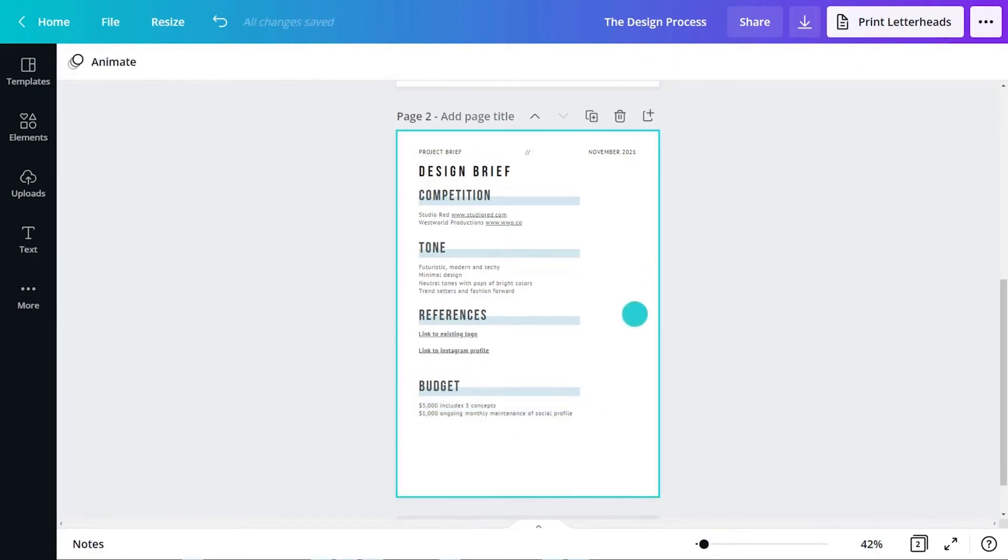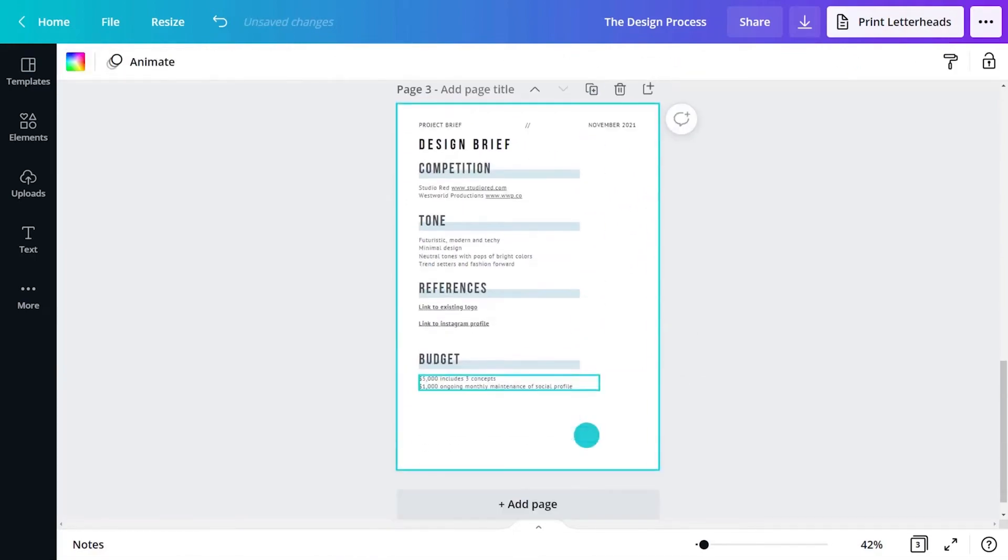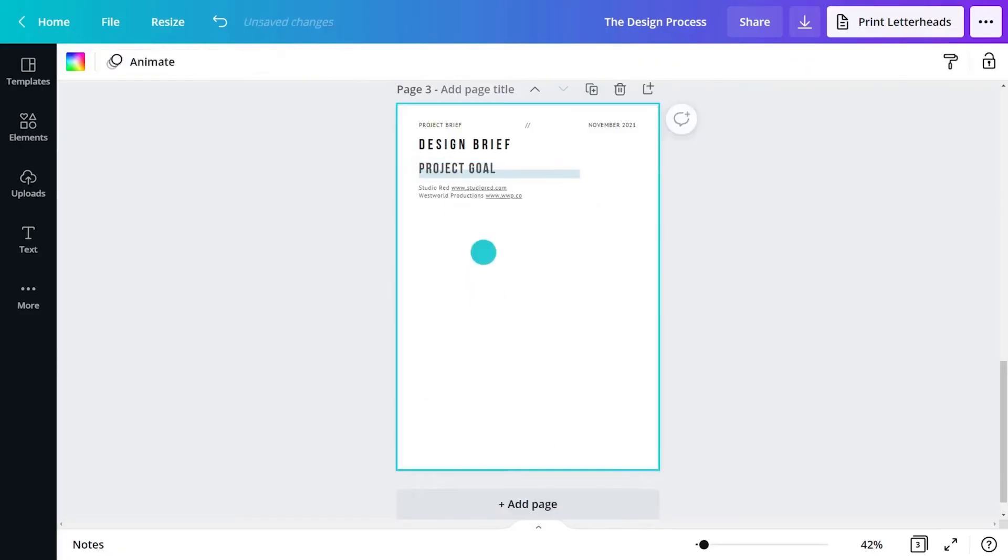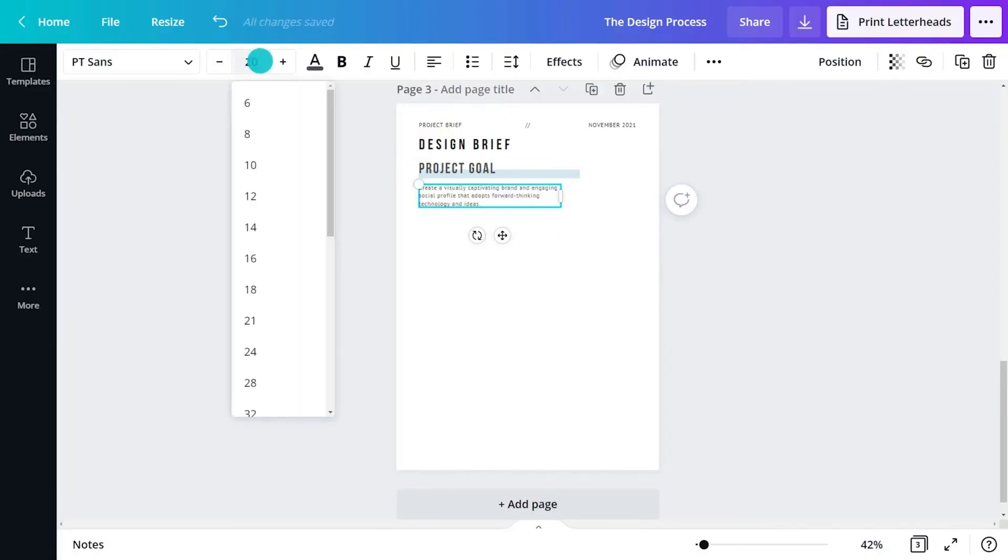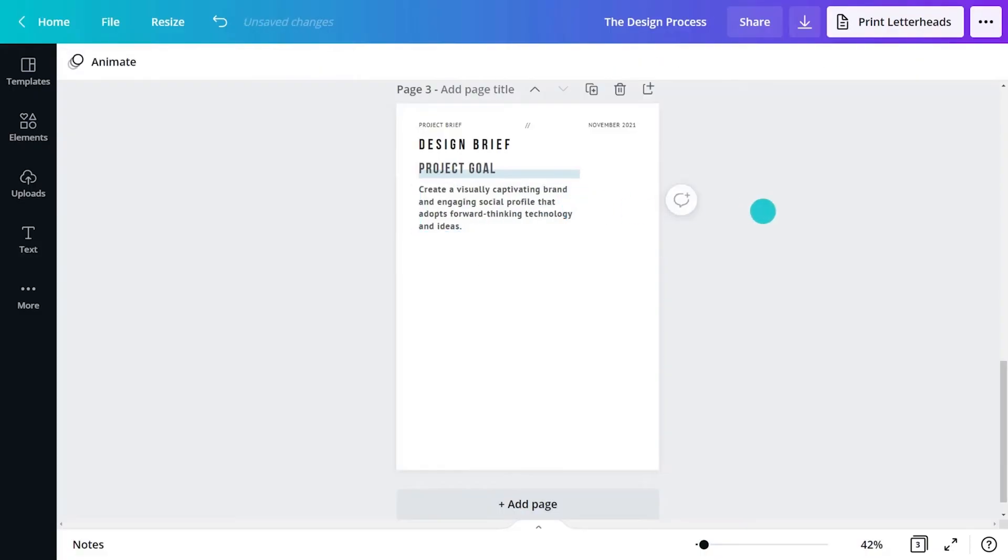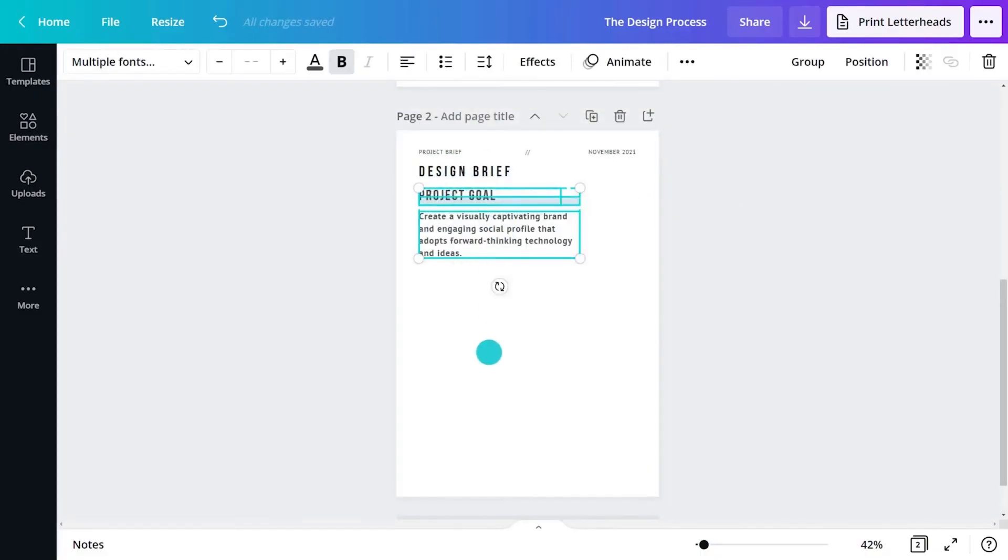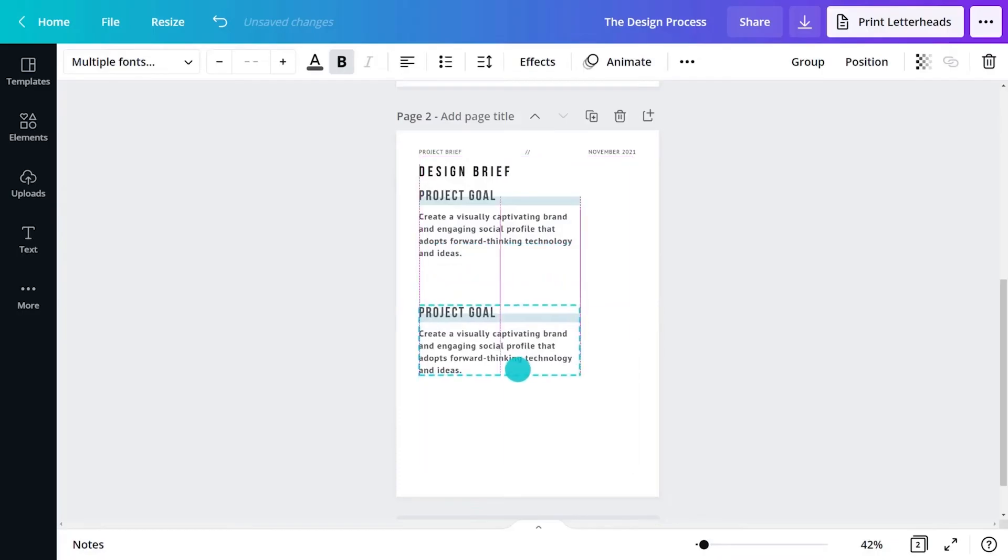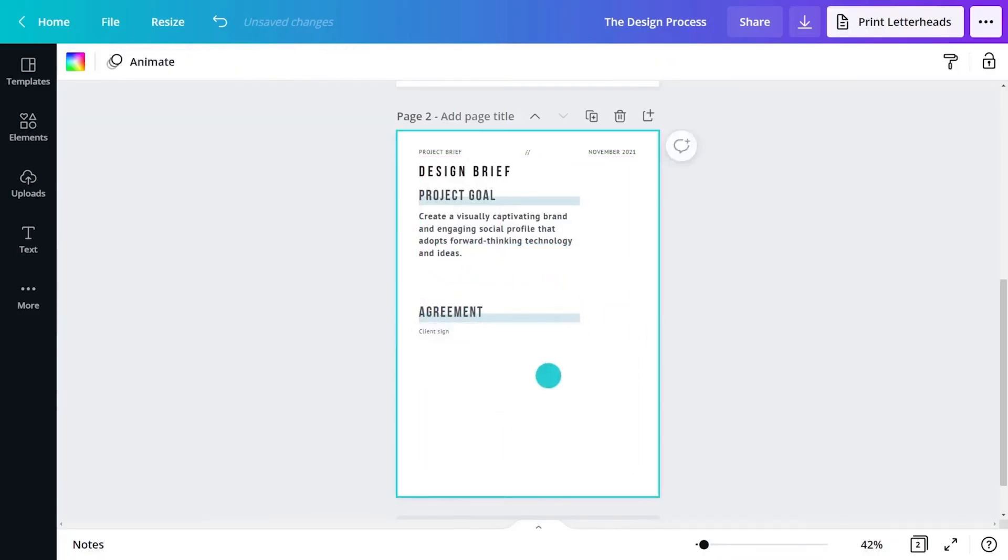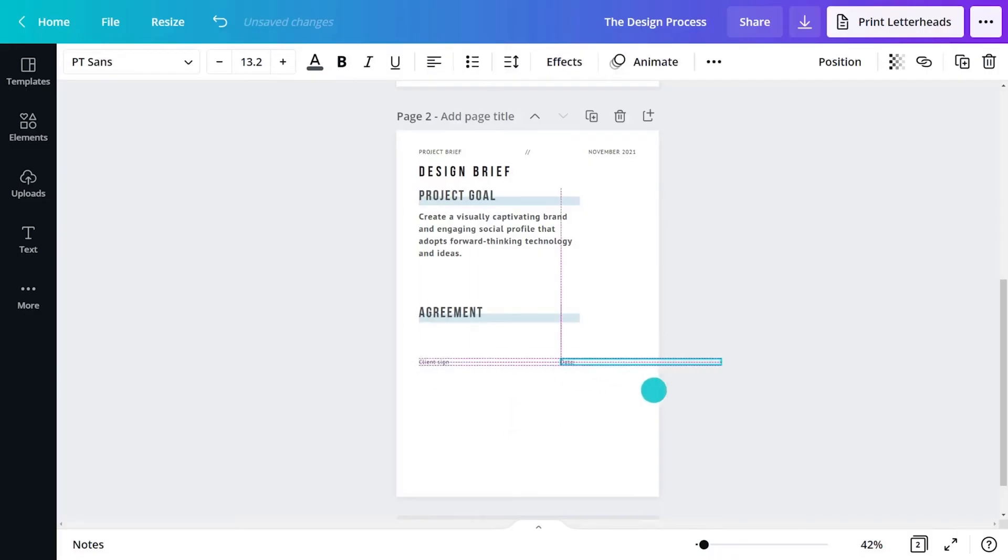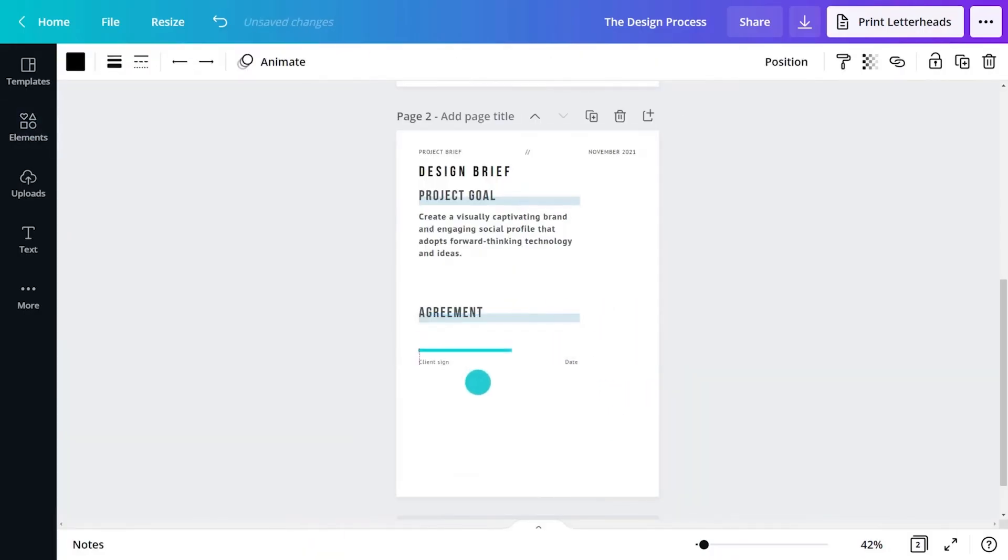The brief will also discuss the ultimate goal of the creative work. Is it to sell more products, gain awareness or change the client's image? A great brief will outline the goal and how the client will measure success. The final area to include on the brief is a sign-off section for the client. A brief must be agreed upon. It serves as a point of reference and ensures the project stays on track.